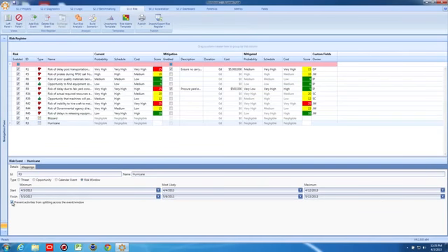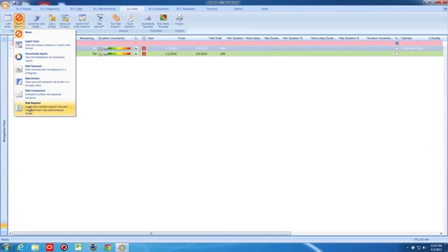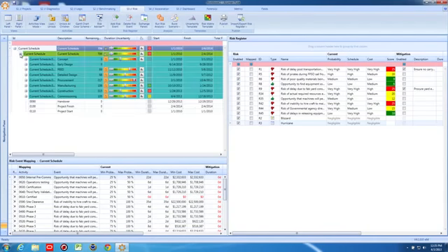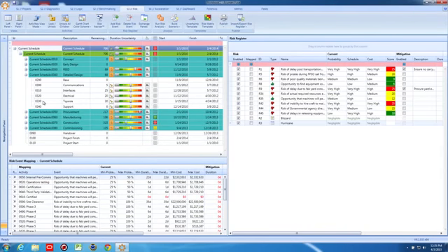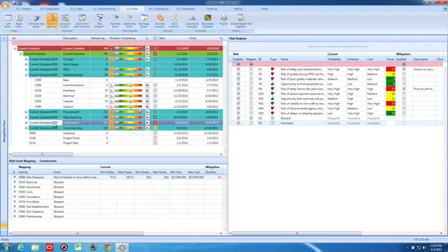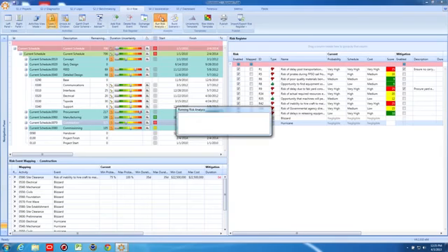As before, we have the flexibility to determine whether a hurricane will prevent us from splitting affected tasks or not. And last, but extremely important, is to map our hurricane risk only to those tasks or groups of tasks that will be impacted by the occurrence of a hurricane.